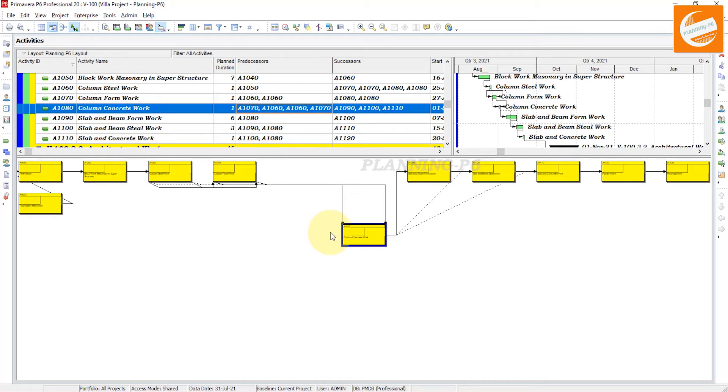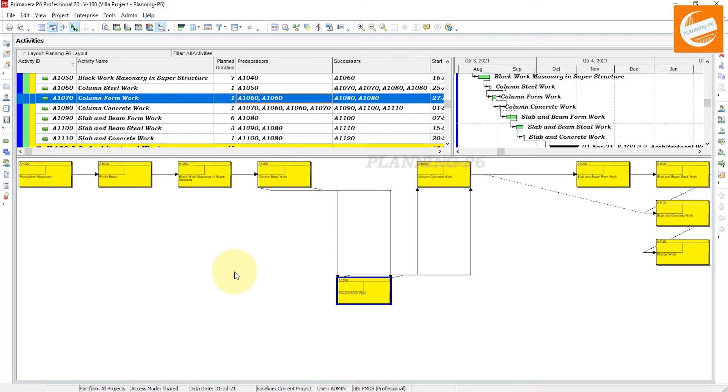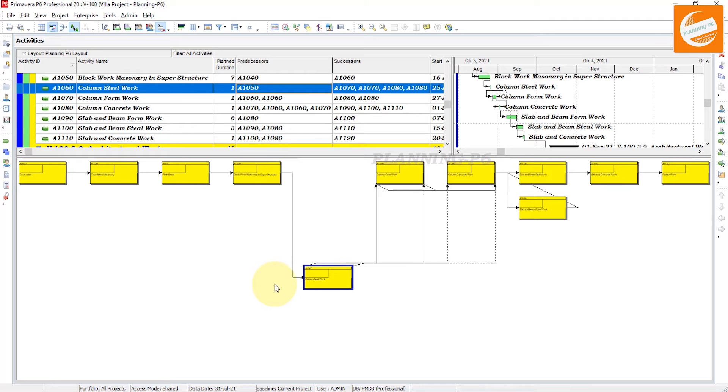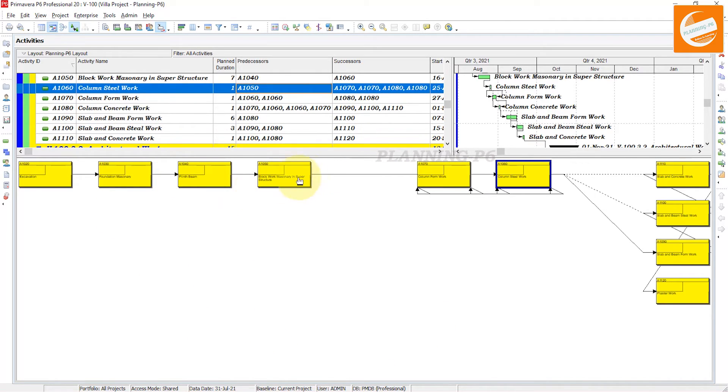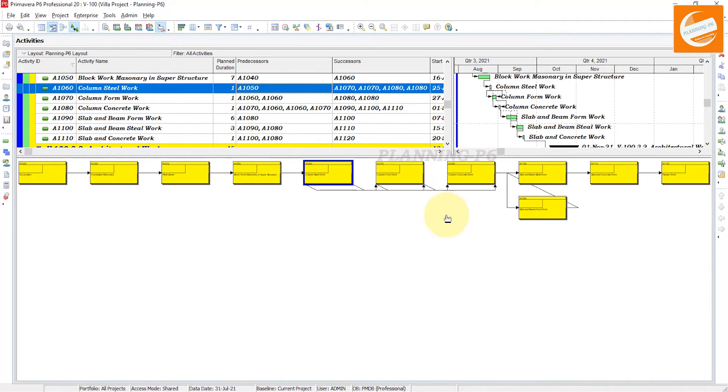If you want to see an individual activity, you can just click on it. You cannot move it, but you can see the relationship. If you put back this one, then you can see the relationship status with the lags. This is how you can use trace logic in Primavera P6.